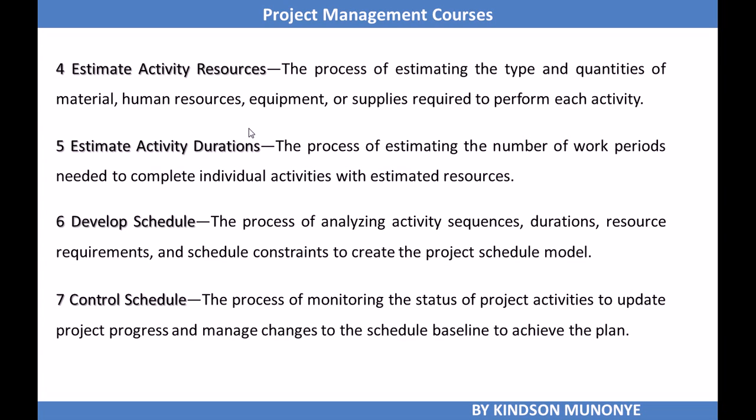We just have one monitoring and controlling process for project time management, and that is control schedule, the process of monitoring the status of the project activities to update the project progress and manage changes to the schedule baseline to achieve the plan. So when you are controlling schedule, you are measuring the project performance, comparing it with the schedule baseline. Is it in line with the time that has been planned? And you make adjustments as needed.